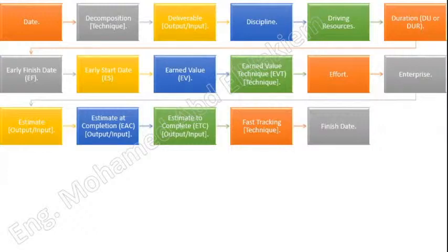Finish not earlier than. A schedule constraint placed on the schedule activity that affects when a schedule activity can be scheduled and is usually in the form of a fixed imposed date. A finish not earlier than constraint prevents the activity from being scheduled to finish earlier than the imposed date. Not earlier than constraints impact only the forward pass calculation and hence the early dates of a schedule activity.